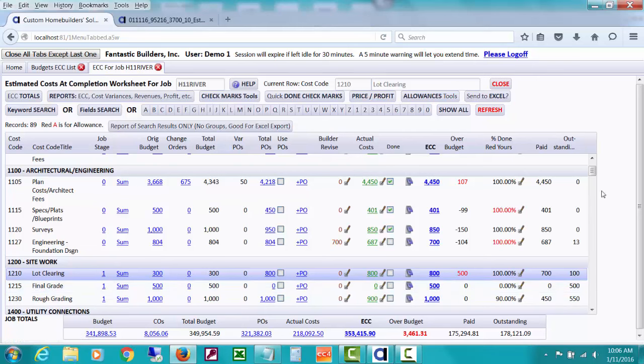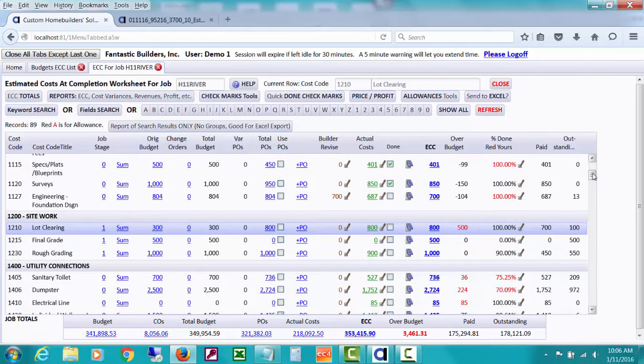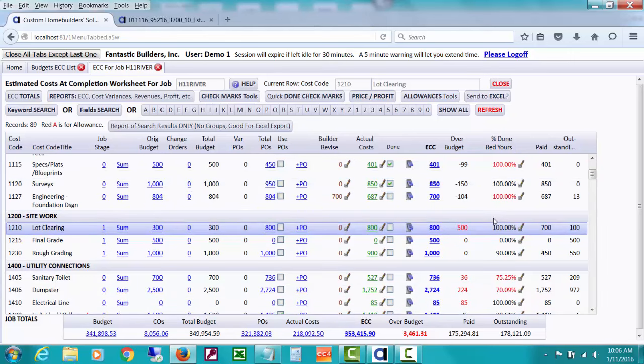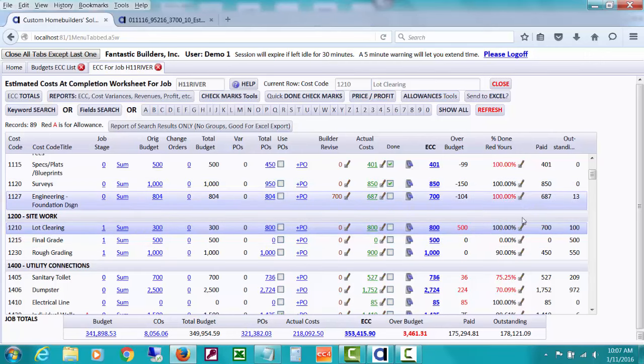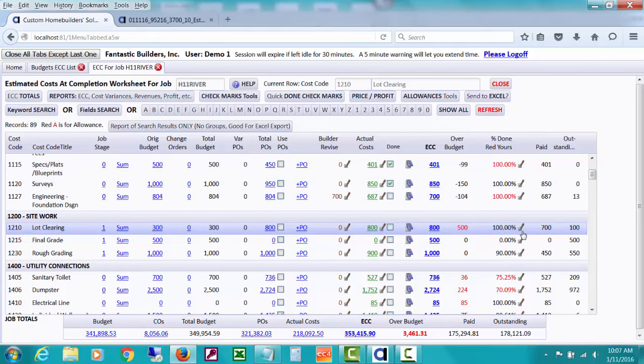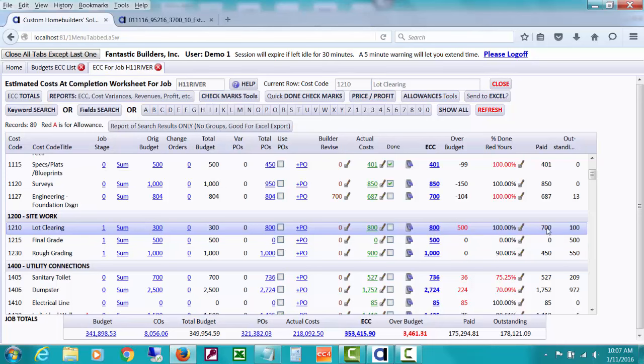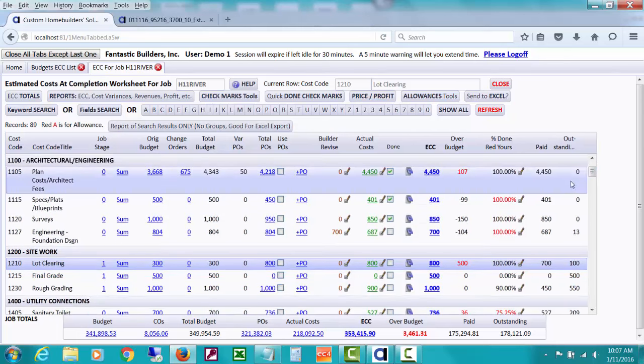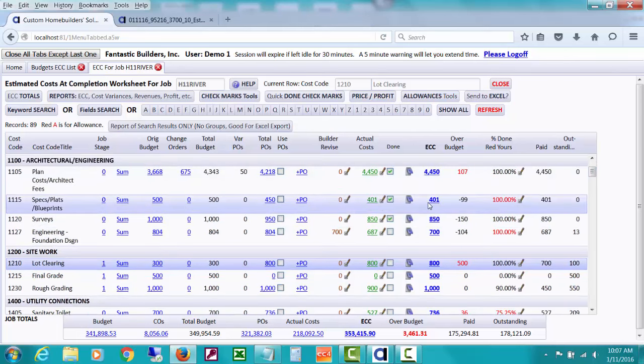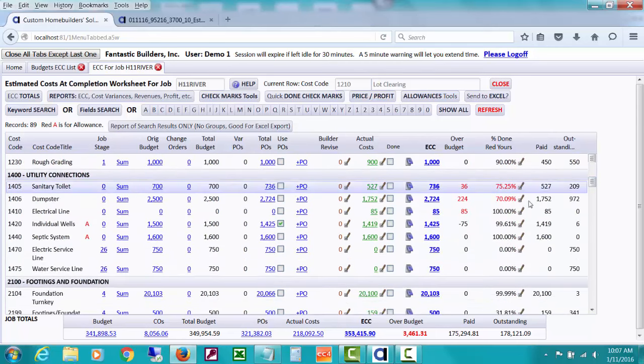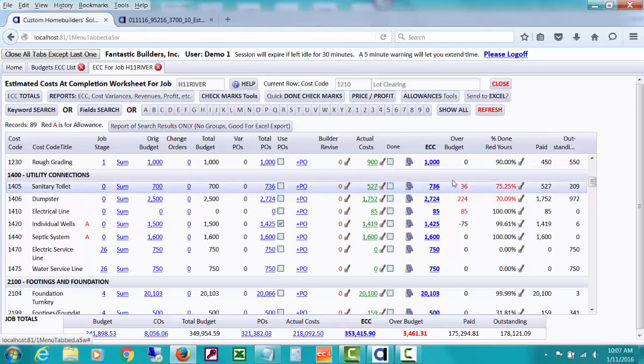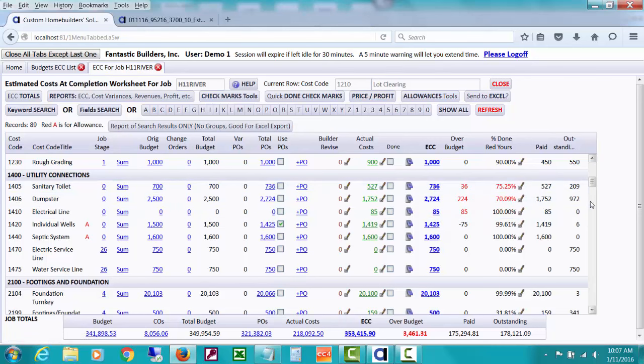The other things over here, and I'll have some detailed videos about this, is it's calculating the percent done, but if you decide you want to type in the percent done yourself so that you can produce some outstanding unpaid costs for things that are completed based on the percent that you have entered, you can do that. That's what that column is about. This column is showing you how much of this, well, don't use that one. It's kind of bad. You can see how much of this $401 is paid, so outstanding is zero. You can see that $527 of this is paid, and based on the ECC, the outstanding is $209.